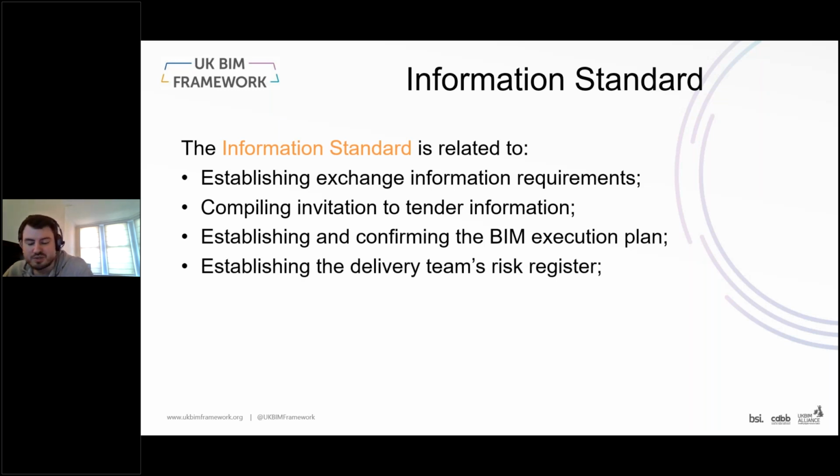Establishing the delivery team's risk register. There may be particular items such as how risks are enumerated, as well as considering the risk of what happens if information is delivered but hasn't actually conformed to the information standard itself. So it can support there in two aspects.